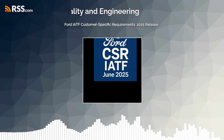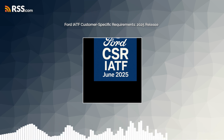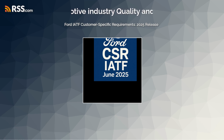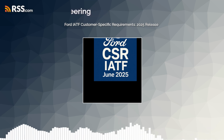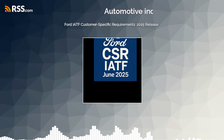Exactly. Ford recognizes that financial health is intertwined with supply chain reliability and quality. So they mandate their direct suppliers monitor the financial viability of their key suppliers. It's not just initial selection. It must be performed annually, typically in conjunction with the organization's internal audit programs. That's a level of due diligence that goes way beyond typical quality audits.